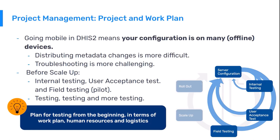In the server configuration step, take into consideration that it can be difficult to update the metadata once users are starting to collect data, and if there is a lack of tools, troubleshooting can be challenging. It is important to refine your configuration as much as possible before deploying it. The internal user acceptance and field testing are the main focus before scaling up. These phases modify your configuration, therefore your configuration should be flexible at the beginning and stabilize until the testing phase has finished.